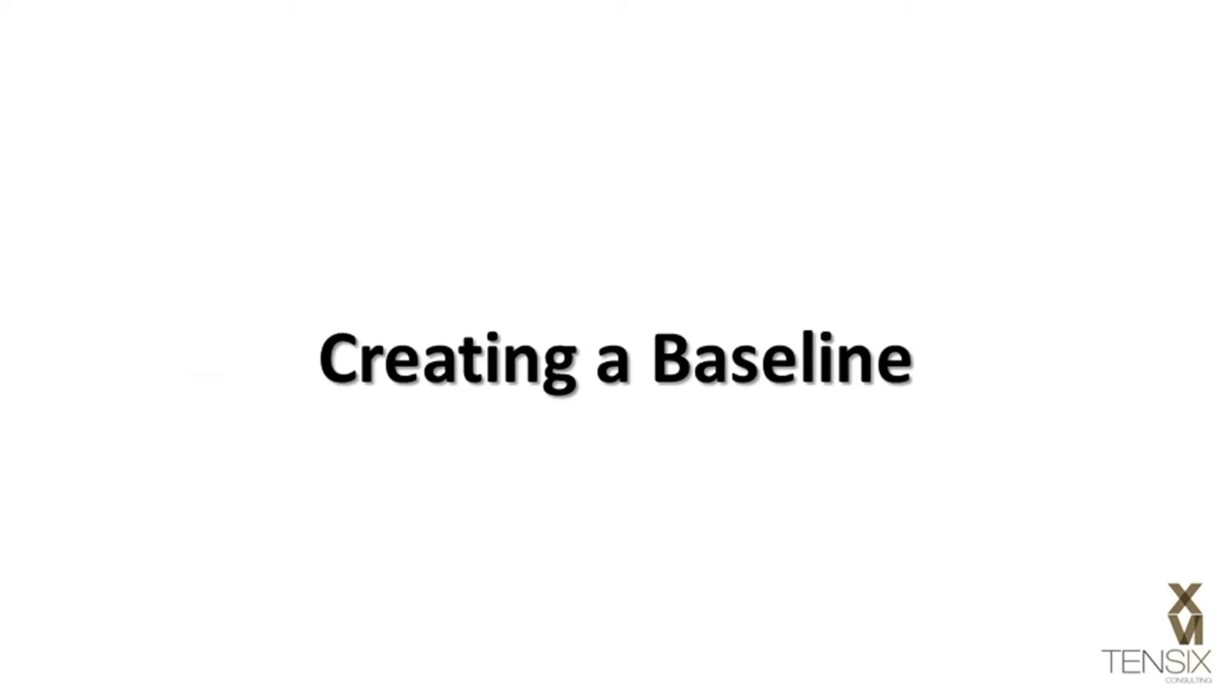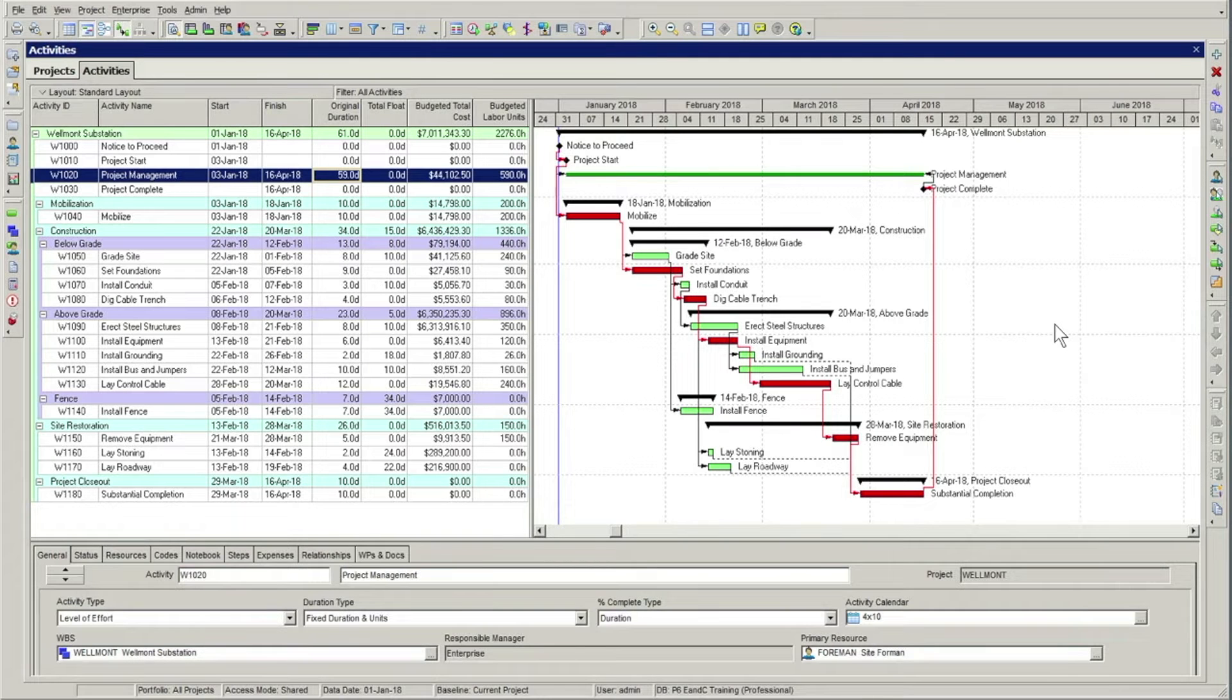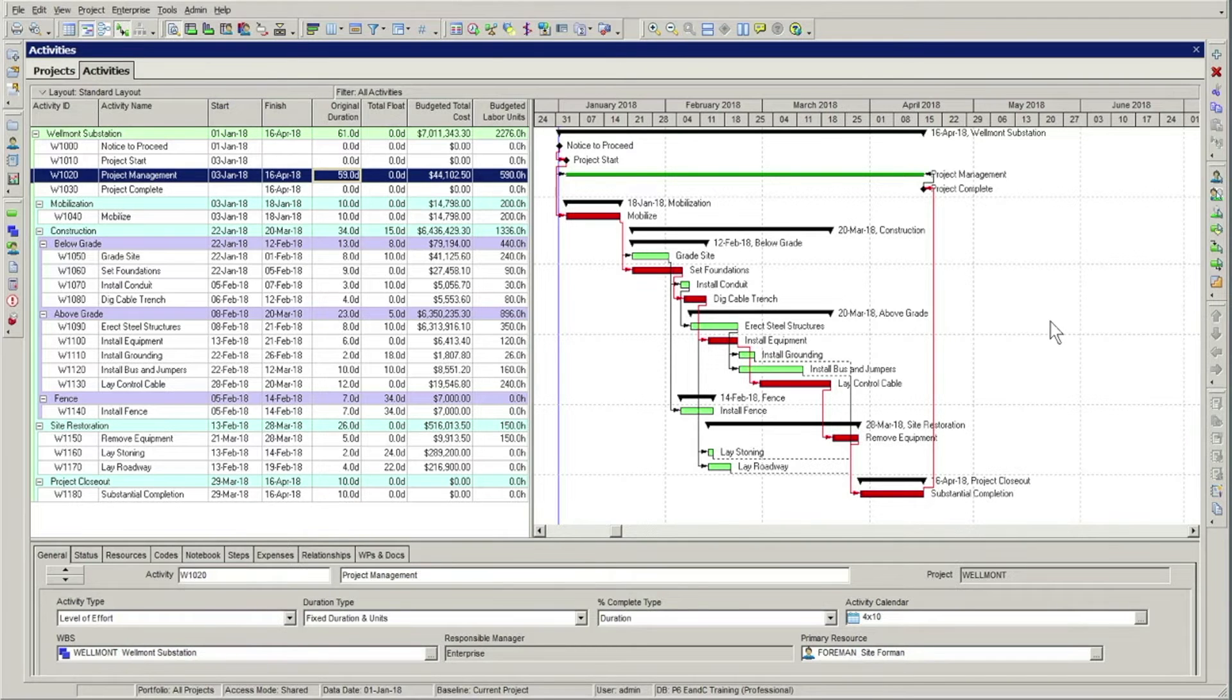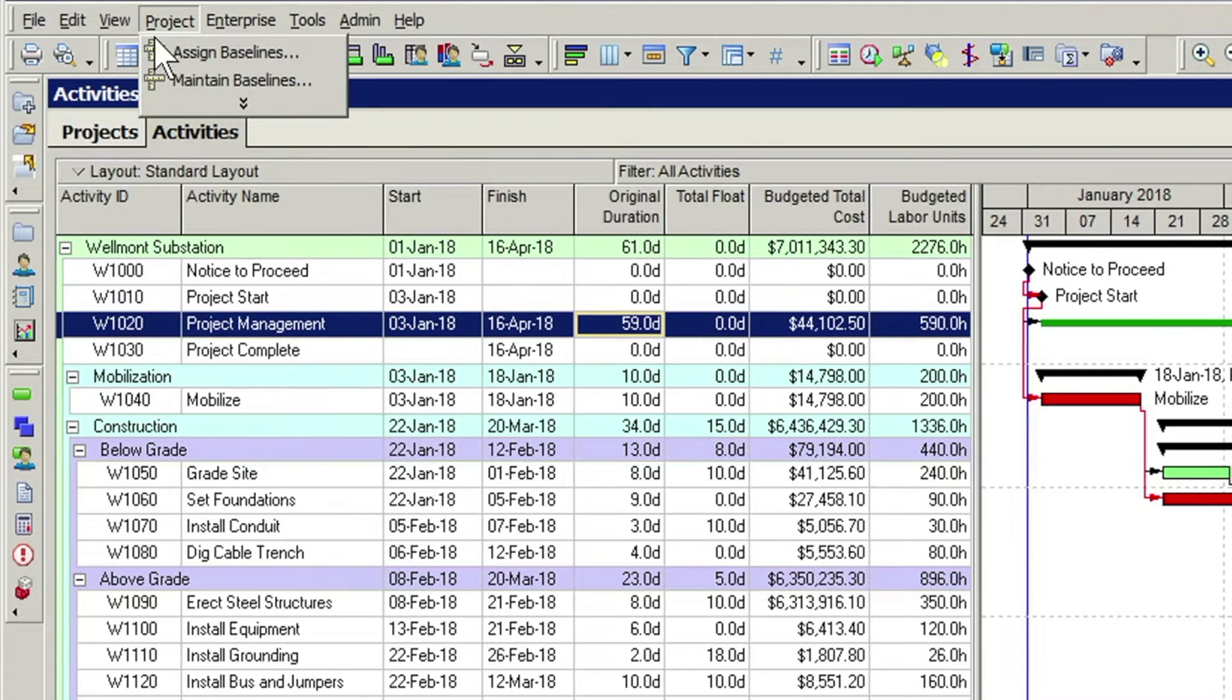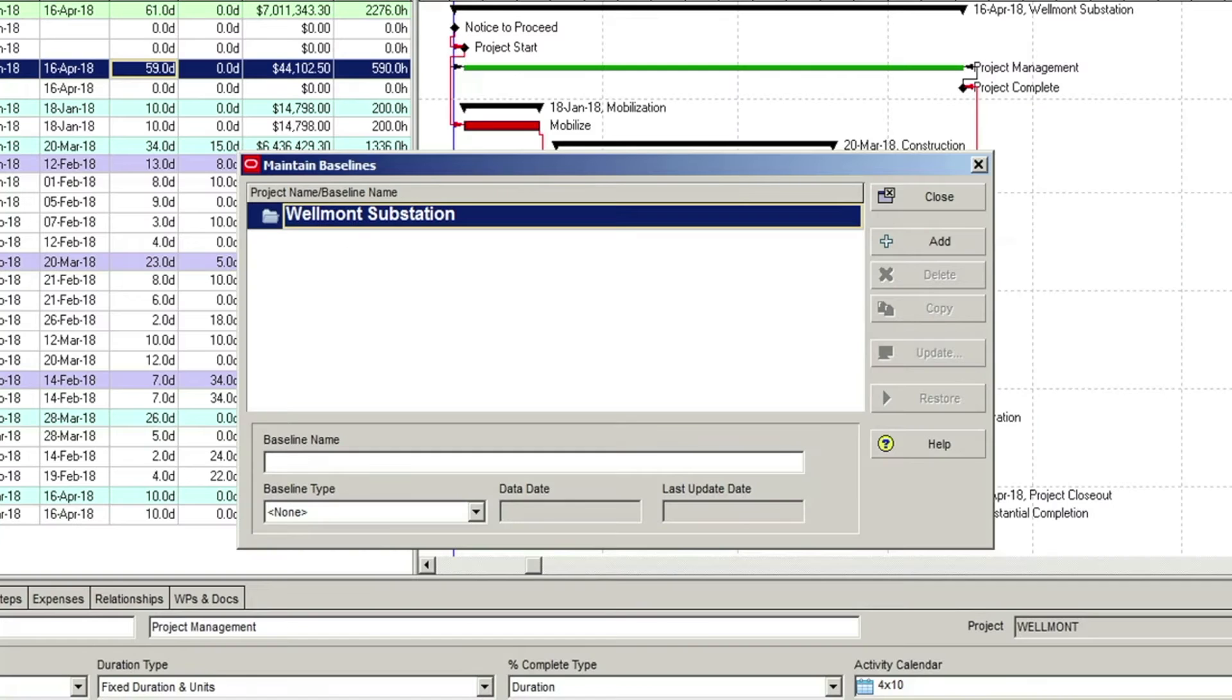Creating a baseline: To create a baseline in P6, we'll be using the Maintain baselines option in the Projects menu. When this option is selected, the Maintain baselines dialog opens.